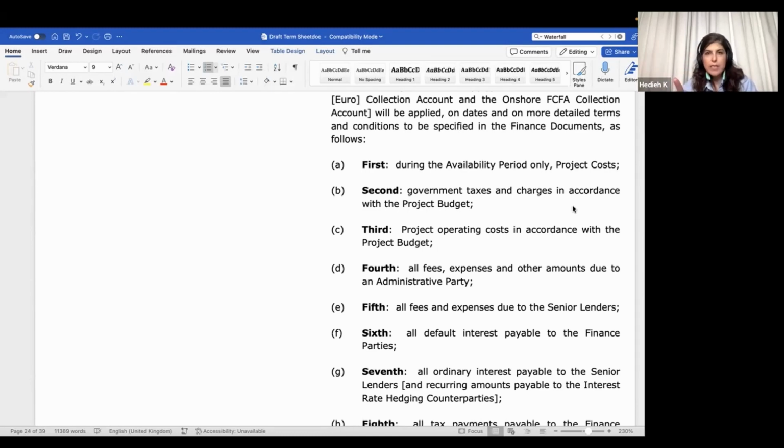They really audit all these project costs, and they just want to make sure that there are no early dividends in these costs, you see. So for example, just to give you an example, in one of my projects, we, with the team, defined the breakdown of the operating cost, and we had one cost item which we called management fees. We sent it to the lenders, and they came back to us and said management fees should not be included as part of the operating cost. It should be paid out as a dividend.